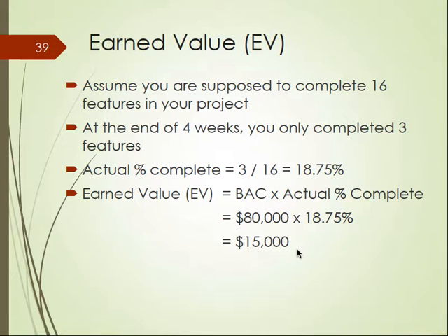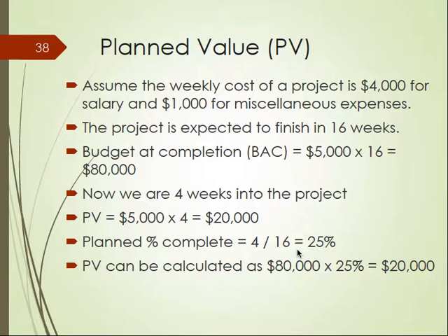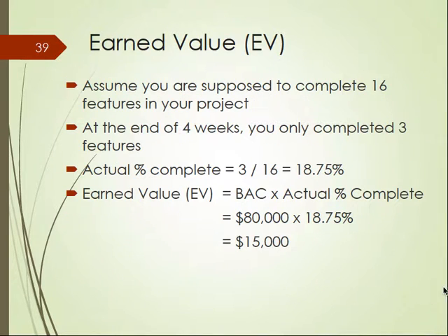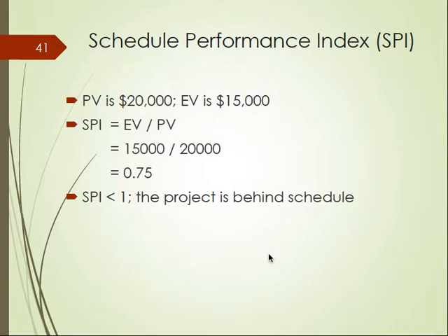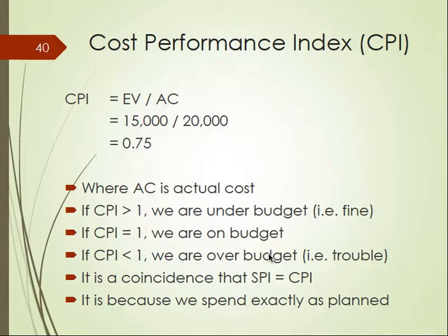So is it good or is it bad? It is no good, right? Because you have spent $20,000, but you actually get $15,000 of value, so you are behind. So we have some measurements to say how well you do. Why do we learn this terminology? It is for project management professionals to communicate among themselves, or communicate with the management, how well the project is doing.